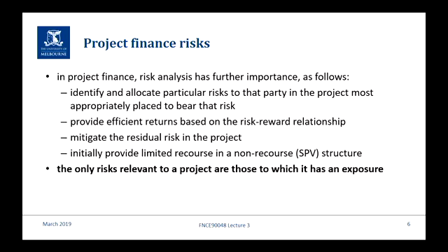So I said before the example of foreign exchange risk. We know how foreign exchange risk arises. You might have a liability to repay in another currency. And if there's an adverse exchange rate fluctuation, you have to repay more in your home currency equivalent. So that's FX risk. But not every project has FX risk. What about those projects that are 100% in one country and all their activity is in one currency? Yes, foreign exchange risk is a thing, but it's not a thing for that project. So the only risks relevant to any project are the ones that they directly have an exposure to.